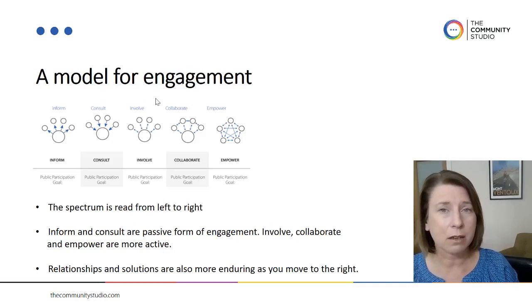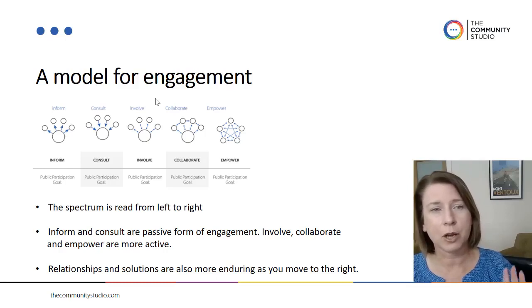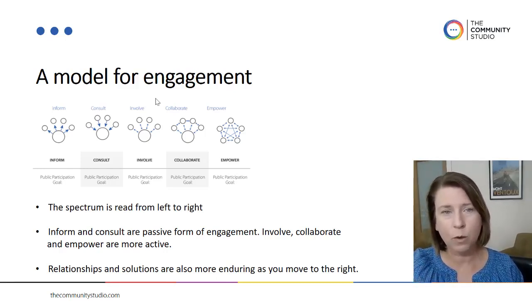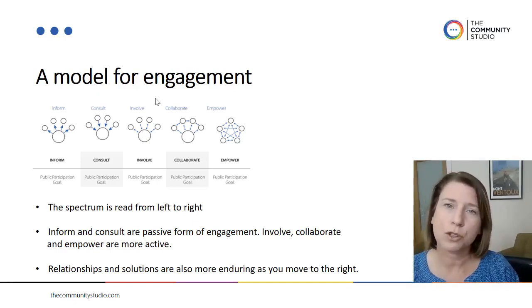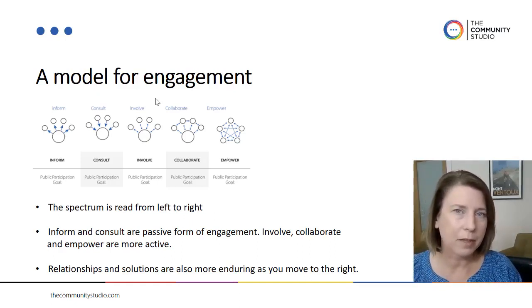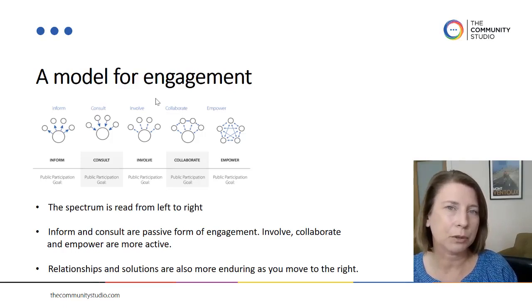Now, inform and consult, as I said, are more passive. They are passive forms of engagement. You can see there, inform is information going one way out, and consult is information coming one way back from stakeholders to you. So a survey is a perfect example of a consult tool. It is a one-way in.